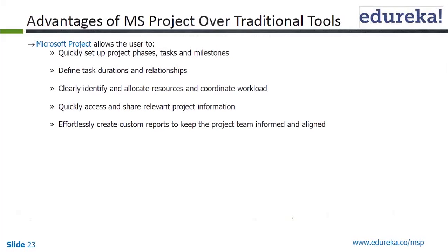So those milestones are 0 duration activities or tasks. These are very important in terms of analyzing how we are faring with respect to your project activities.